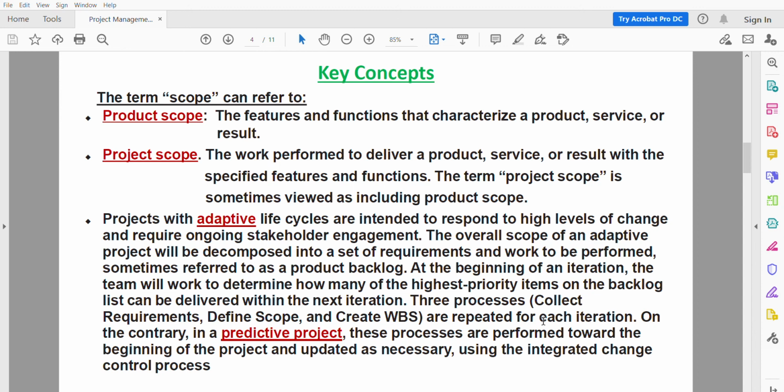If a business analyst is assigned to a project, requirement-related activities are the responsibilities of that role. The project manager is responsible for ensuring that requirements-related work is accounted for in the project management plan and that requirements-related activities are performed on time and within budget and deliver value.